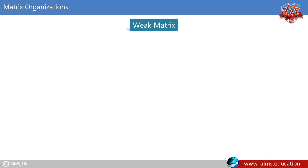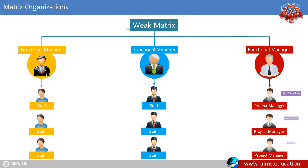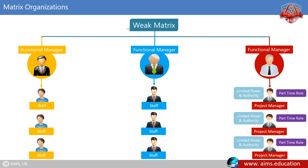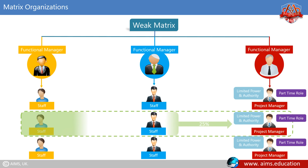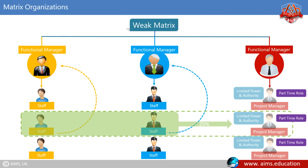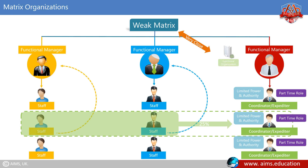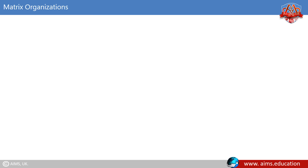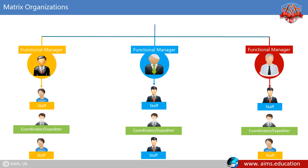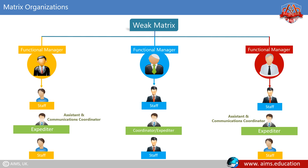In a weak matrix, the project manager has a part-time role with very limited power and authority. Team members are only assigned to projects for 25% or less of their time; for the rest of the time, they return to functional assignments. The role of project manager is more like a coordinator or an expediter. The project expediter works as a staff assistant and communications coordinator but does not make or enforce decisions. Project coordinators make some decisions because they have some authority and report to a higher-level manager.